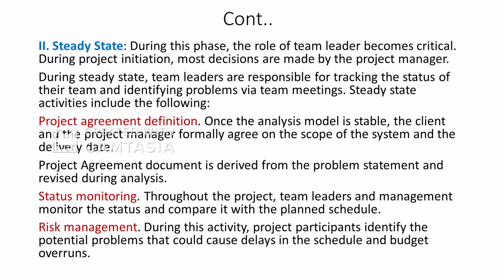During this phase, the role of the team leader becomes critical. During project initiation, most decisions are made by the project manager. During the steady state, team leaders are responsible for tracking the tasks of their team and identifying problems via team meetings. The steady state activities include the following.